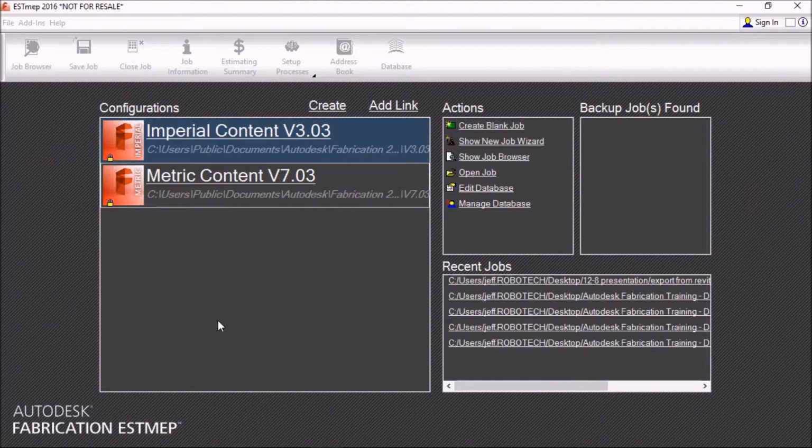Okay, so a minute ago we had a Revit file. We were provided with a Revit file, and we used the STORM design line element and STORM graphic element tools, and then we pushed it out to an RIF file. We then went to STMEP. We created a blank job, we imported that RIF file, and then we were able to get information from that new fabrication model. We saw the different items. You get information from each item. We saw a detailed list of all of the items. And then we even had a quick look at the cost estimate.